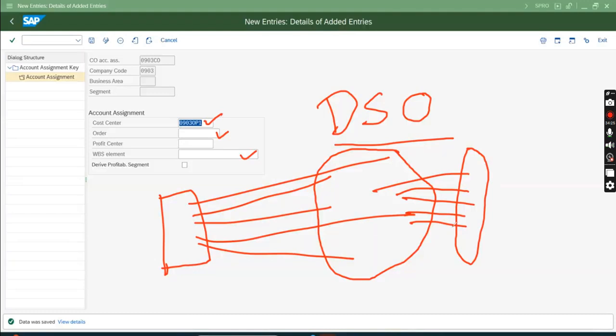Okay. So this code is, because I'll forget in the next 3 weeks, for the first 3 weeks, who worked in which shift, for how long, how many days, if they do not record it, then they will forget. So they'll record it in a particular project code, and later once the project is approved, the PMO will create the actual code attributable to the DSO project only. Then all the costs, all the time will move from here to here. So this can be called an internal order or WBS, work breakdown structure. And from there it will go to the cost center, CC.